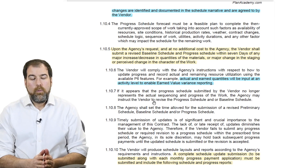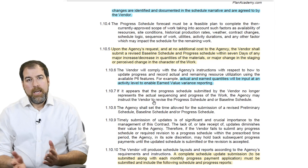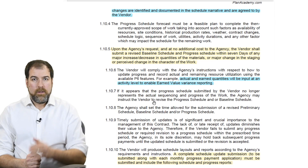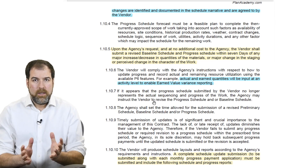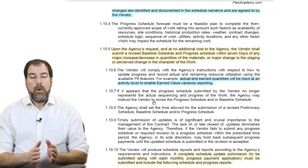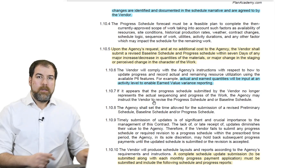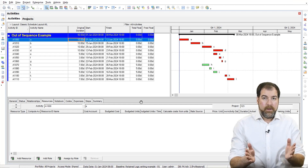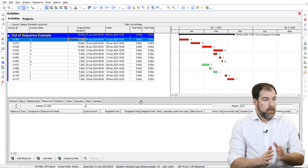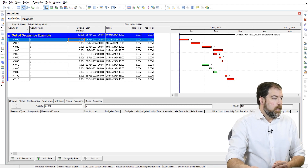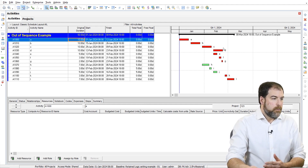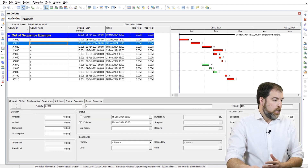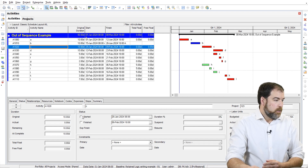A lot of the time we fudge things when we progress — because it's extra clicks, extra effort. But you as a scheduler need to be super detail-oriented and make sure this stuff represents what happened in the field. Let me give you an example of what out-of-sequence looks like in P6. Here's a simple schedule. Let's say we're progressing for the first month. Out-of-sequence looks like this: I skip A, but I finished B and I started C.